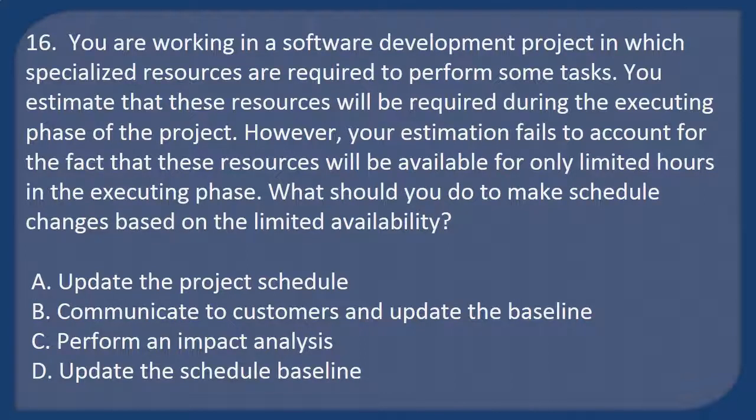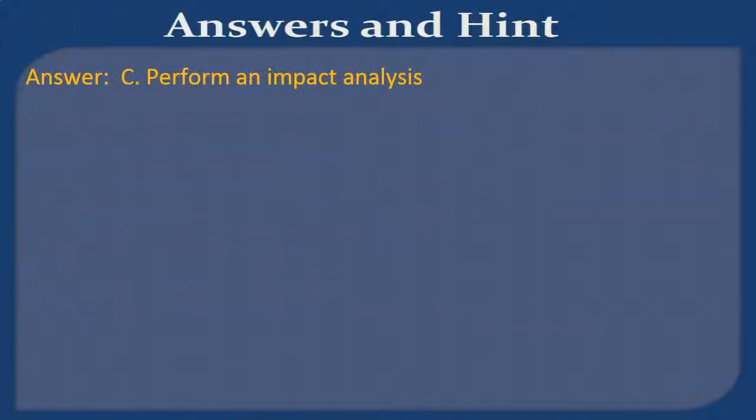A. Update the project schedule. B. Communicate to customers and update the baseline. C. Perform an impact analysis. D. Update the schedule baseline. Answer: C. Perform an impact analysis.